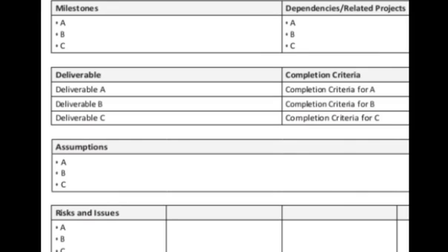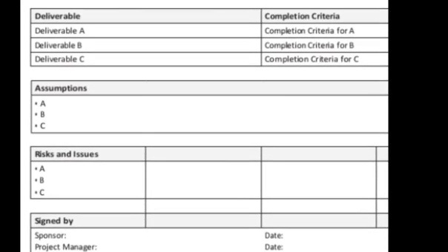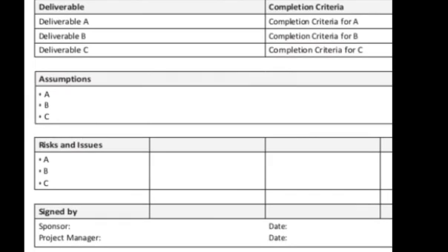Another thing you can be assuming as well is that everybody involved in delivering that deliverable at that milestone will be in good health. What if the person responsible for digging the foundation falls seriously ill, and for 2-3 days he could not come to work? It means 3 days are already out of that 7 days you gave as your milestone. So all these things are some of the assumptions that you are making in giving all these milestones. So you equally state them there as well.